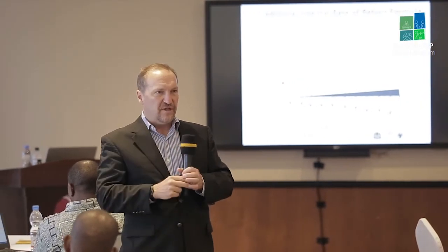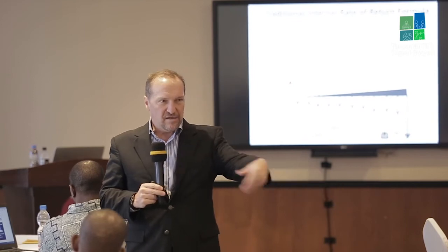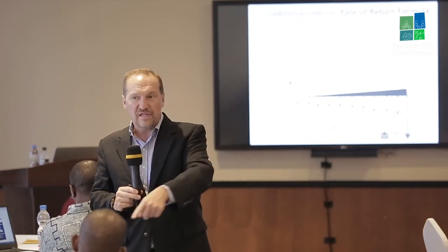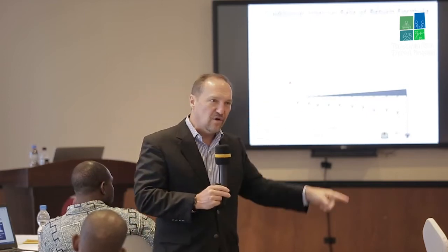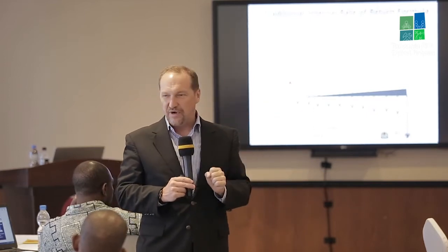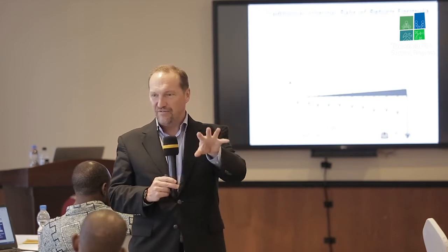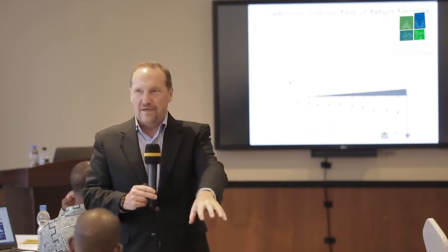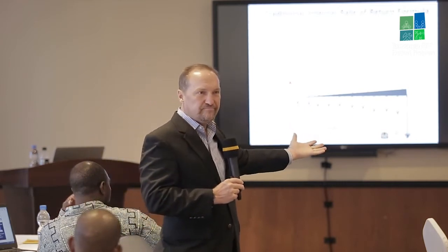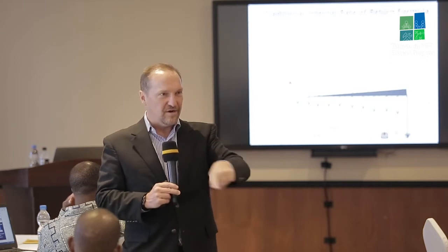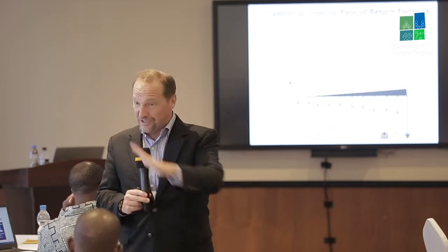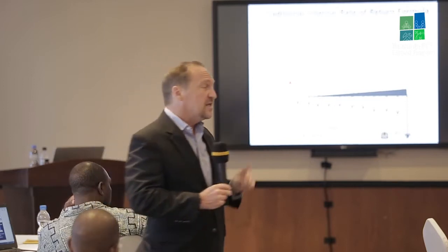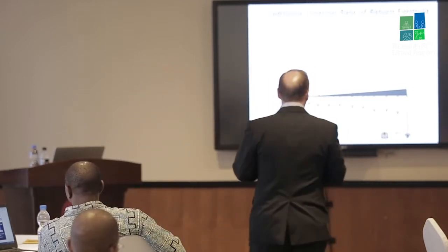That rate is like an interest rate. If we were to treat these cash flows, here's your deposit and then here's your net cash flows, we are assuming that each net cash flow gets invested back in the project, just like the offspring of livestock. You're not going to say, okay, we're going to take all of the young offspring and sell them. We're going to keep them in the herd. They are going to then become breeding. We're going to earn interest on interest. That's compounding. So the traditional IRR formula sort of looks like this.